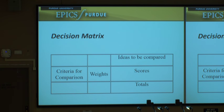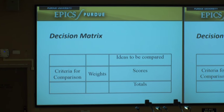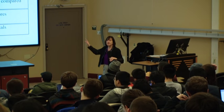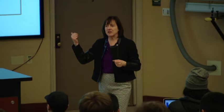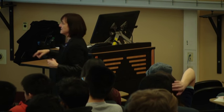If we're thinking about our projects, what would we use for the criteria for comparison — where should that come from? Specifications. If we want to know how to make the best decision we're going to want to base it on the specs. If it's important enough to be included in our weighted decision matrix it should be captured in our specifications. I've heard people talk about projects where they went with an option for a reason that's not included in the specs. If it's important enough to inform your decision, you should have it listed as a specification.